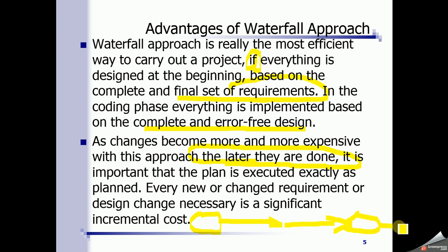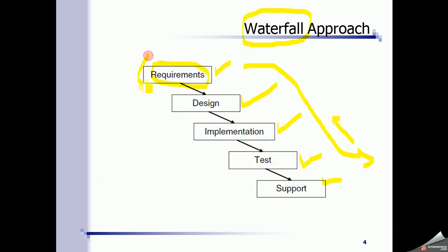And now when you perform testing, you find out a problem in the requirement phase. So now if you have to fix a requirement, you will have to go back again to design. So you have a problem in the requirement, you make this change, then you have to revise the design, you have to revise the code, and then you have to repeat all the testing process.